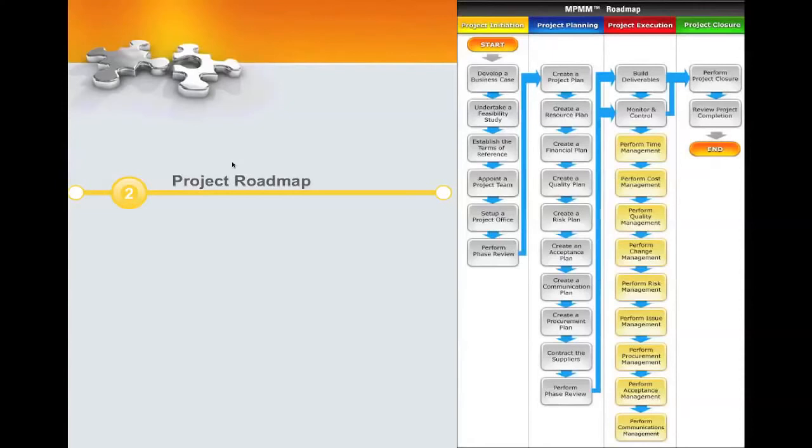A lot of times it may be my stakeholders, or maybe the end users who come up, and they may want to, at the time we're doing this, actually expand the scope. So something may change the scope of the project. So maybe they want to expand it, so you have to take those changes back to your change control board. Have the change control board evaluate the change and approve the change.